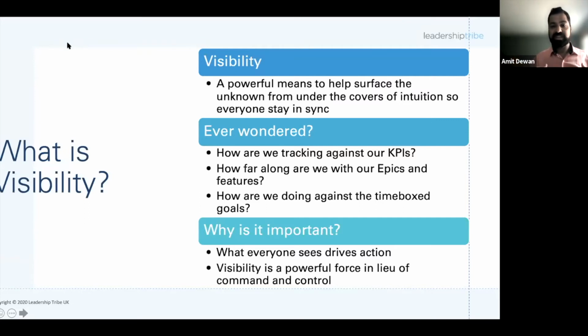So the business comes back maybe with new requirements, new user stories, features, whatever. And the team, without visibility, without the right tools, is either absorbing that, saying this is super important, we absolutely have to respect that because it's coming from the business and it's time critical. But they don't have the tools to back it up with data and say, this feature you've just thrown on us is a 50-point feature.